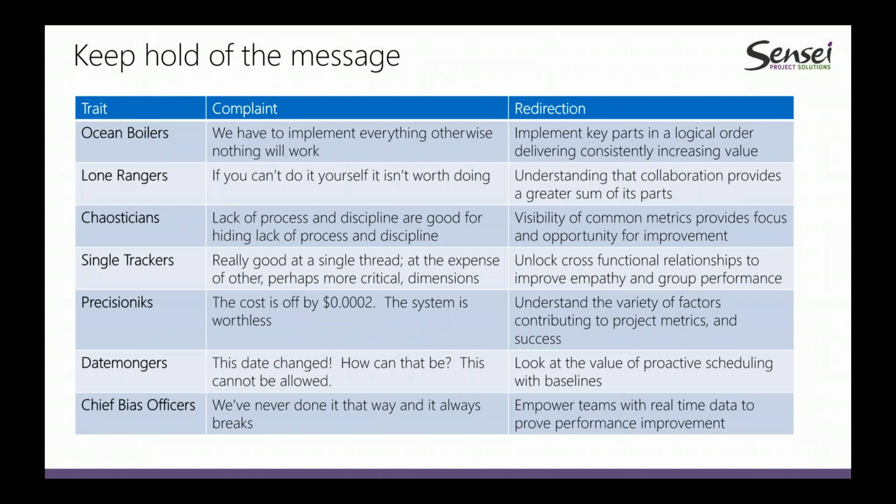One of the beauties and strengths of Microsoft Project is that scheduling engine, so you can understand multiple inputs into a date and have it tell you its best estimate of, in a complex schedule of over 100 lines. It's amazing to me how many people try to do that in their head, and they shouldn't. Let's trust our schedules. Let's build them correctly with predecessors and successors, and then let's understand where those deadlines hit and whether we're going to make them or not.